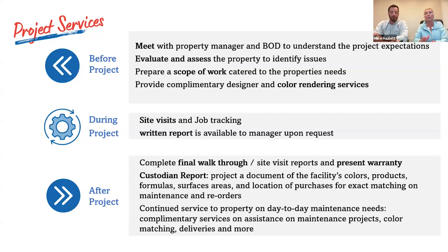And we will come out and we will provide site visits during the job. We will track it based on what the expectation is of the board and or property manager. So if you want us out there once a week, we'll be out there once a week, and you will get those site visit reports digitally, or you can have them written out. Whatever is easiest for you, we will be there from the start of the project, when they're setting up, when they're pressure washing, to the very end, and to make sure that everything is done.